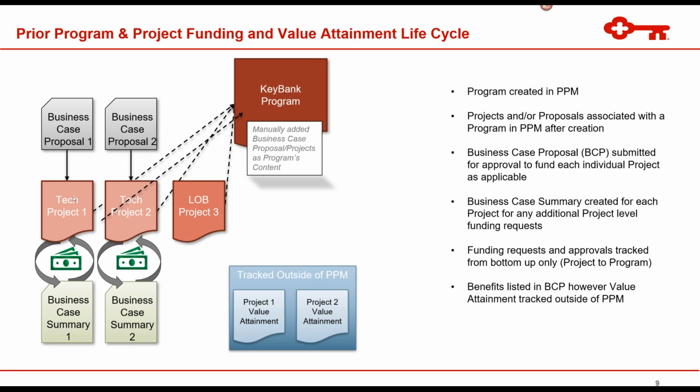So you would add each project that was part of the program individually. And then from a funding standpoint for programs, there really wasn't any mechanism in place. It really was based from the bottom up, from the project level, and then the program was just basically a loose association from a financial standpoint of the project funding.